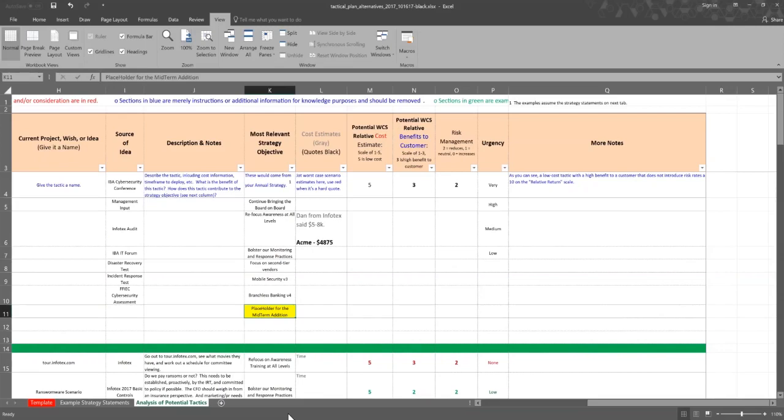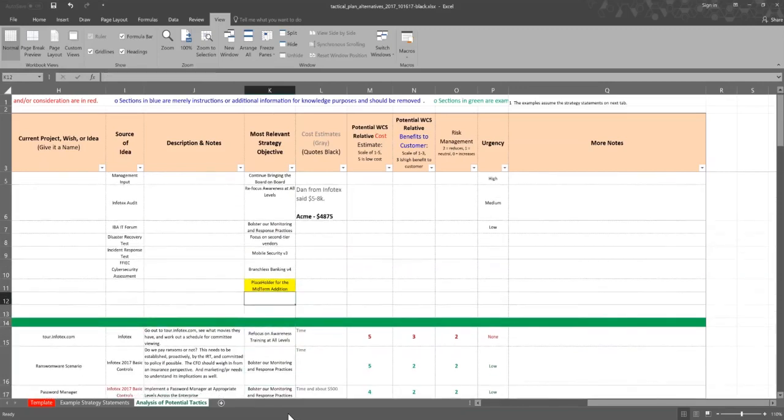If we're lucky, we can say, hey, great, I'm glad, what great timing. I'm going to add that into next year's plan. And I feel like you can get away with that. Probably July, August, and September, you can be saying, oh, great, glad you brought that to our attention. We're going to add that into next year's plan. But in February, March, April, and May, we're going to have to maybe have a placeholder for the midterm edition. And I have seen one bank, not a lot, but I thought it was a good idea, at least one worth bringing up in our webinar this year.